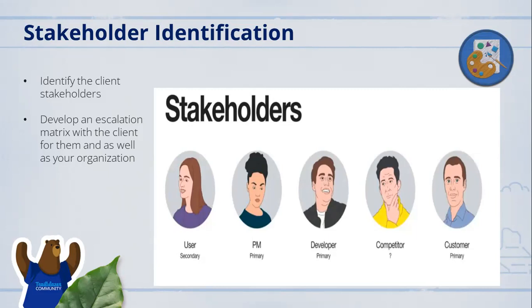At the same time, build an escalation matrix for the client as well. So if things go south during the implementation integration, during any stage of that implementation integration, the client also is aware with respect to whom to reach out from the implementation side as well. So it's important to identify the stakeholders, define the stakeholders from both ends, and then begin with respect to the implementation integration, and have a clear channel of communication as well as clear flow of communication that is there.